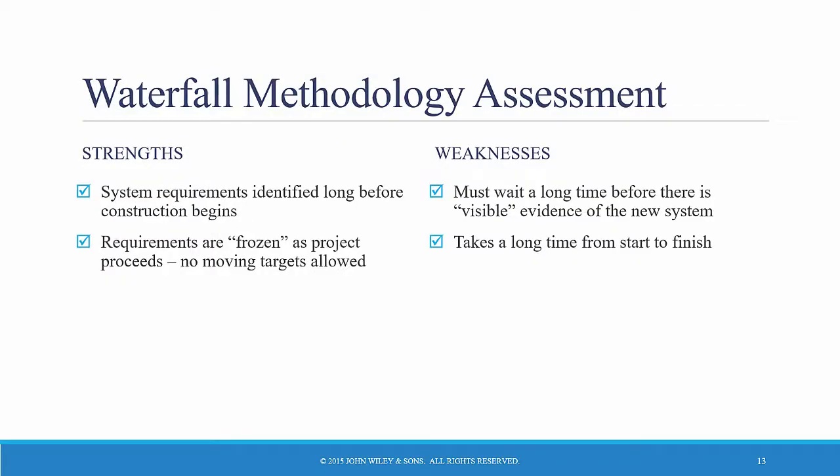The waterfall approach is appropriate for certain projects and has advantages and disadvantages. You must have nailed down all of the requirements at the beginning, in analysis. This is usually a good approach for large, complex projects where you have a lot of resources and time, and you know what all of the requirements are. Requirements are identified long before programming begins, so requirement changes are limited as the project progresses. However, that's a two-edged sword — if you don't do that, you'll have a horrible failure. The requirements must be frozen with no scope creep.